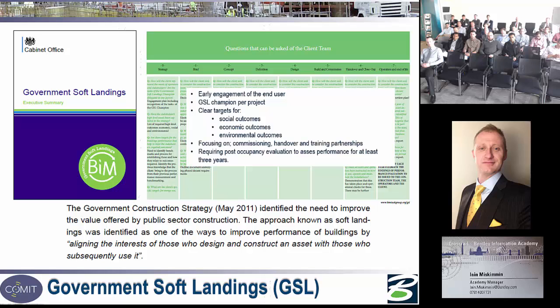So once something's complete, for 3 years after that, it needs to be monitored, it needs to be evaluated, and the impacts that we've had on those 3 targets need to be recorded, to find out if you've met those targets. If you haven't met the targets, at the moment there are no contractual clauses or commercial problems to say you didn't meet the targets, right, I want some money back. I think that probably will happen in the future, but at the moment it's a case of, right, well, we know what went wrong, let's correct that and make it better in the future.